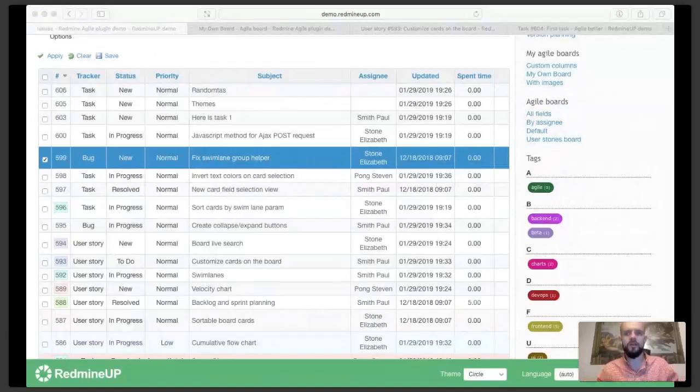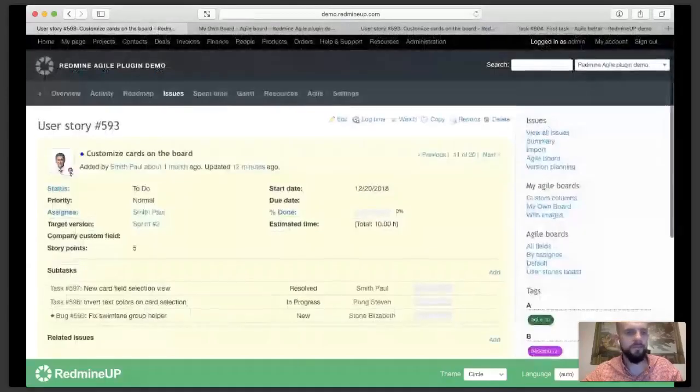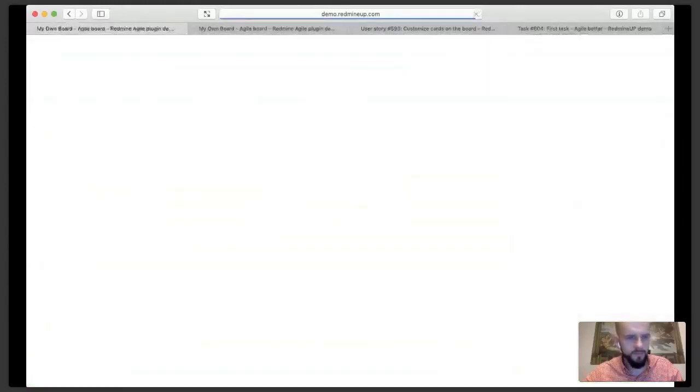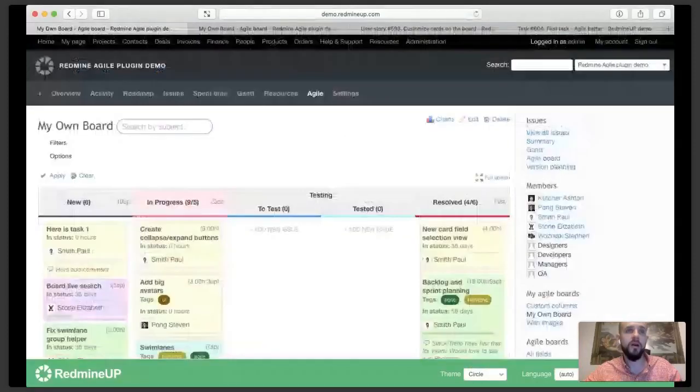What it means is you check if the items, the tasks, are assigned as stories. So they're not just like "set up server." This can also be tasks, but maybe stories this way. For example, "customize cards on the board, so the users will be able to use them." You discuss notes, if there are any notes assigned for a task. You discuss the acceptance criteria. Those are business criteria, the criteria which would be applied by a manager to say whether the tasks are accomplished or not. This is different from the definition of closing the tasks for developers.